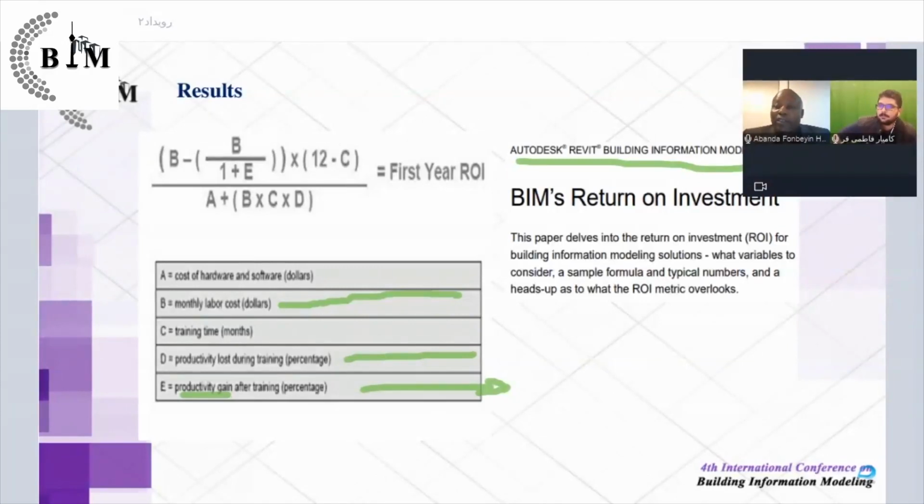You can approximately estimate that you used to go 10 times to a site, but now you're only going 5 times. That's a productivity gain of about how many? 50%. So the estimation is different for every project, but it is always positive in any kind of project.